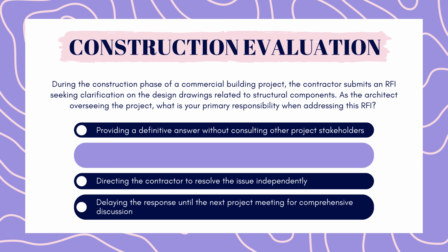And the correct answer is reviewing the design intent and consulting with structural engineers if necessary before responding. The architect is responsible for overseeing the project's design and ensuring that the construction aligns with the design intent. If the RFI involves technical aspects related to structural components, it's prudent for the architect to consult with the structural engineers who are involved on the project.